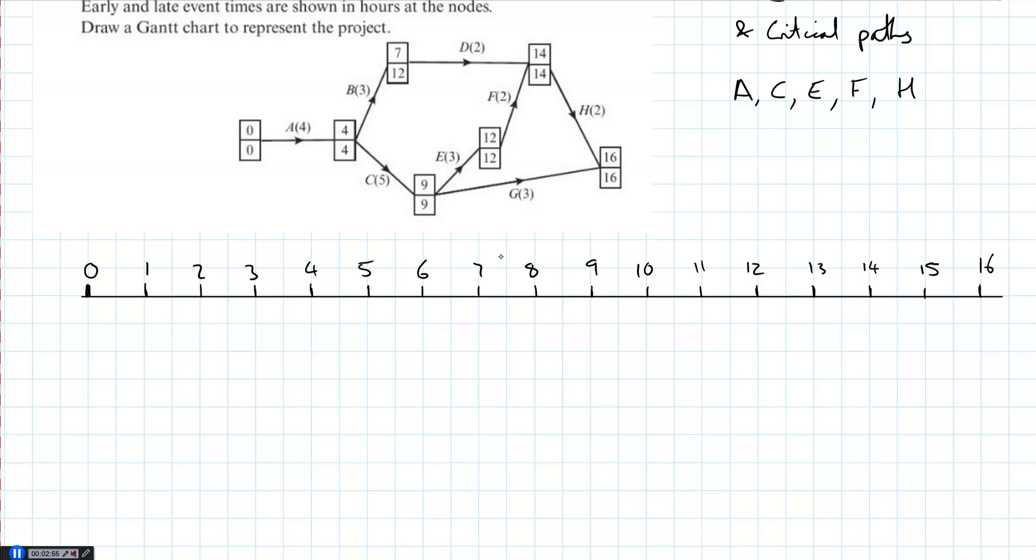The whole point of critical paths is that they don't have a float, so there's no gapping between them. So we're going to start with A. A is four days. You can use a ruler if you want to make things a bit easier for you. So we're going to put A, and you put them as a block on a row like this, and label it in the middle.